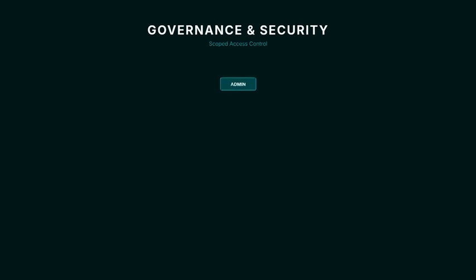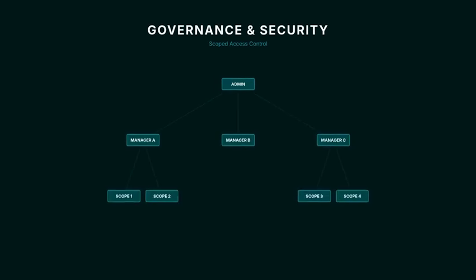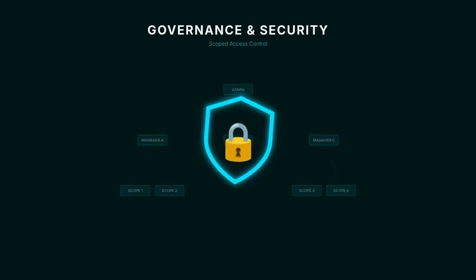When a project manager's OBS node is linked to a set of WBS elements, they can only see and edit their scope, a critical security and governance feature. Navigate to Enterprise, then OBS. Build your tree here and prepare to assign it to your EPS nodes.